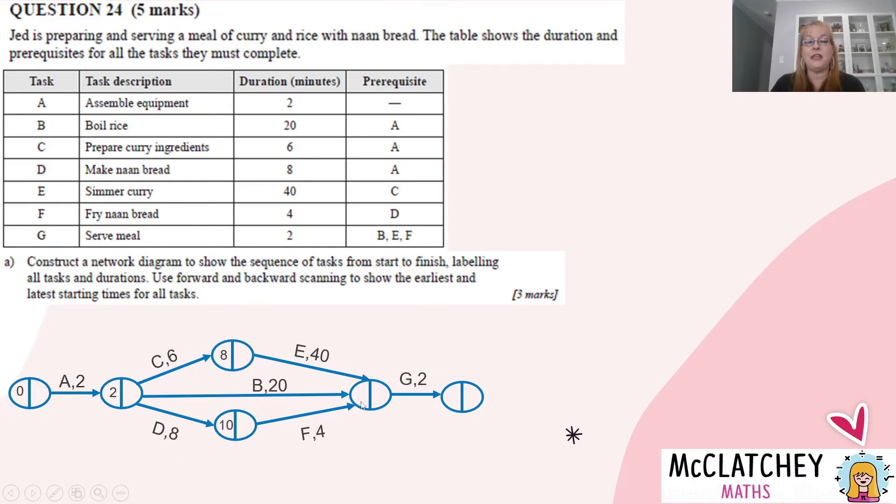But we need to have a think about what's going to go into that bubble. Okay, it'll be the biggest number out of all the choices. So eight plus 40 makes 48. Two plus 20 makes 22. And 10 plus four makes 14. It's got to be the biggest one, because we've got to wait till everything's done before we can start activity G. So that means that 48 from across the eight plus the 40 will go into here.